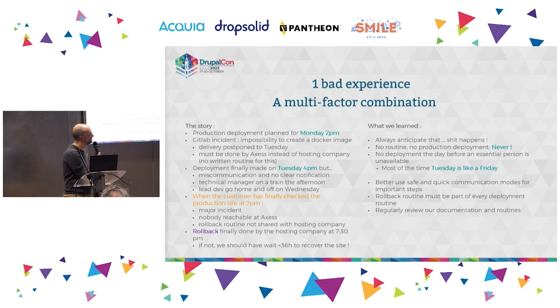So, also to conclude about that, what is very important in the documentation of a deployment process is the steps, but also to think about checking the availability of every person concerned by the deployment, having your rollback routines written, and also very important to have a clear and quick communication process and quick notifications.